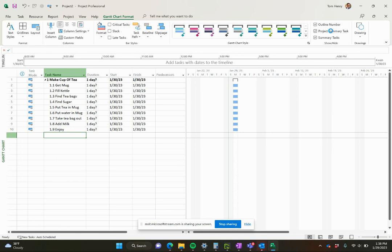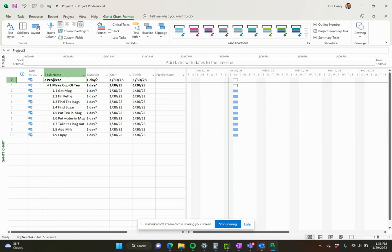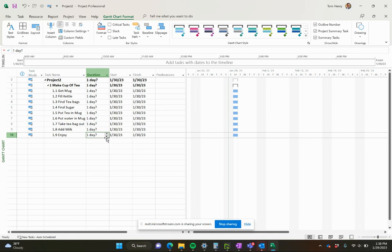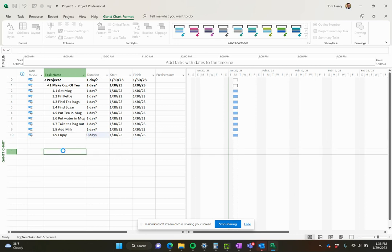You've also got a project summary task. So you don't need to create a task to house all your tasks. That is going to summarize the entire project based on the name of the project when we name it. And you can also add a milestone. I can make enjoy a milestone. I think we all understand what that would mean. To make a task into a milestone, just say zero days.